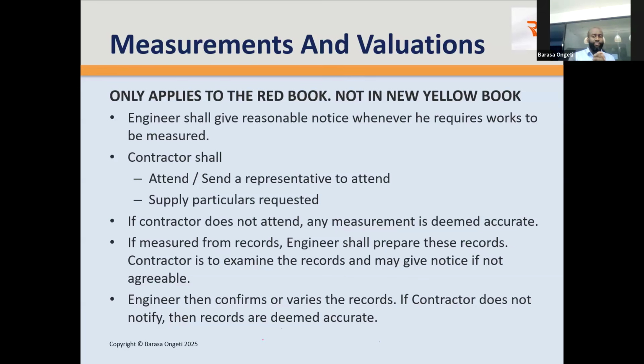If it's measured from records, some contracts specify that the work is measured on records, right? Not on the road. So you just measure the drawings. Records simply means drawings, right? The engineer shall prepare these records. But do you see this in practice? Usually, even if it's measured from records, it's still the contractor who does the preparation of records.